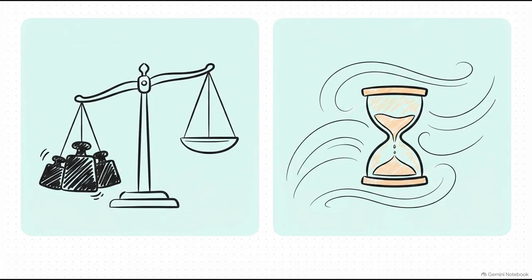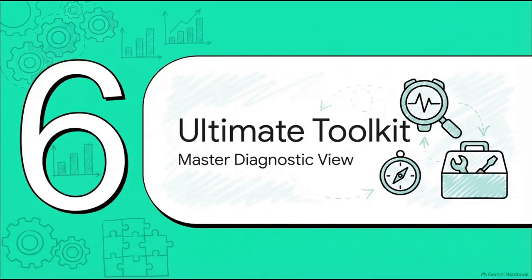To treat this overallocation symptom, you've got to prescribe one of 2 remedies. The first is resource leveling. This completely fixes the overallocation, but it extends your project's critical path, meaning your timeline gets longer. The alternative is resource smoothing, which cleverly uses available schedule flow to delay certain tasks without extending the final project deadline.